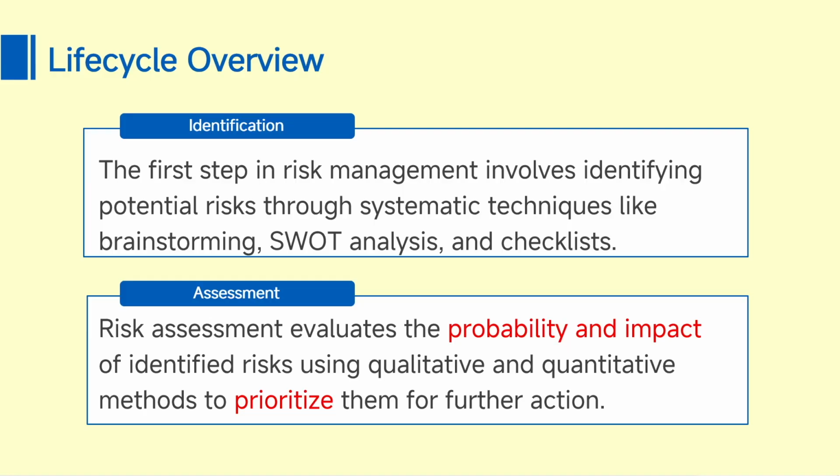The second thing with respect to assessment is the impact. Even if it has a higher or lesser probability of occurrence, the impact is the major thing. Impact is what kind of risk is going to happen, whether it is a monetary risk or a performance risk or any casual risk, and how it is going to impact the software development. So that is the assessment, and based on the probability and impact, we will try to prioritize the risks and handle them one by one.